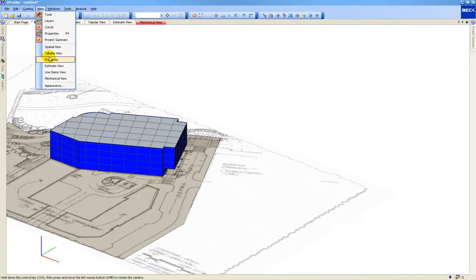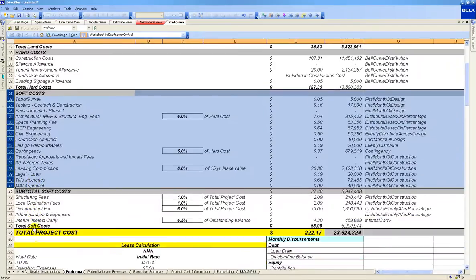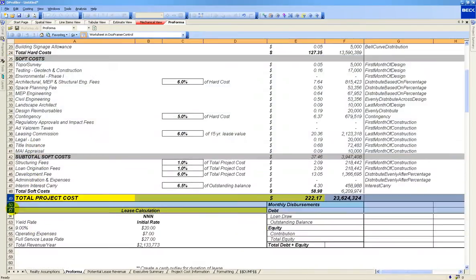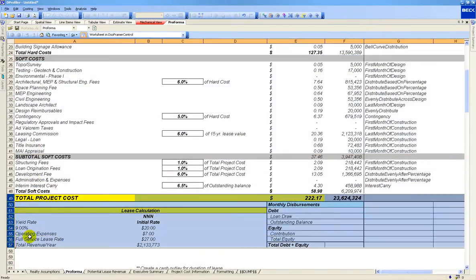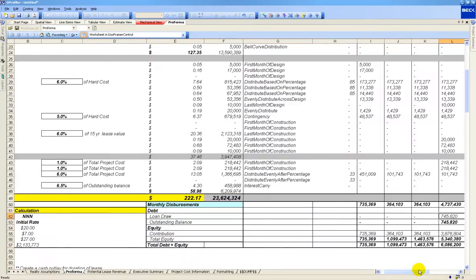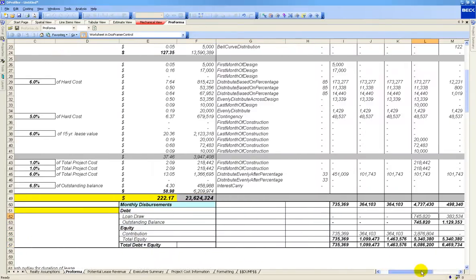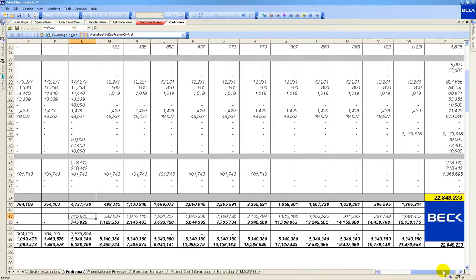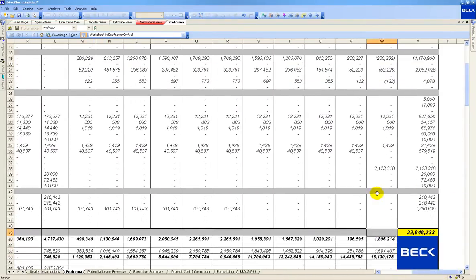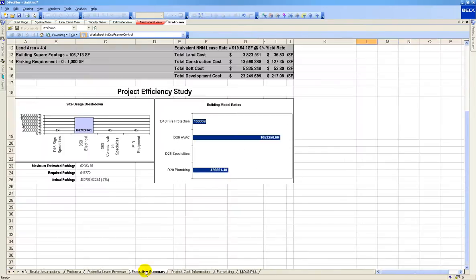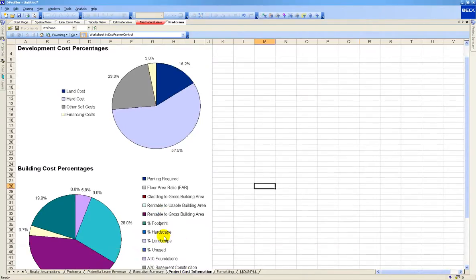Because dProfiler is often used to help building owners make go-no-go decisions, Beck Technology has also integrated a real-time development proforma. This shows the total project cost, including fees, land costs, and all other development costs, to arm the building owner with the financial information often needed to make a go-no-go decision. Like the estimate, the proforma is synchronized with the model such that lease rate and cash flow information is updated as the model evolves.